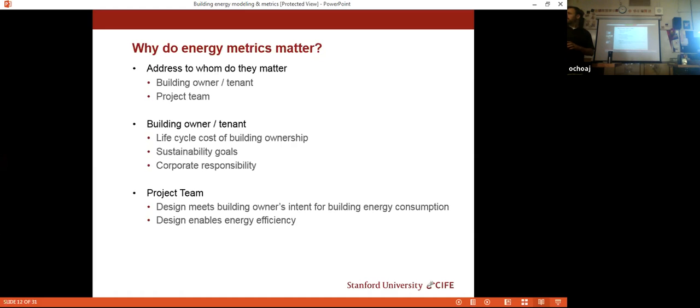He told me that they estimated a project, and the client said yes to everything. But when they started the project, they didn't estimate the energy cost of building, bringing the materials in, and the tools they were going to use. So that was extra money the client didn't have. That's a big deal. What was the solution? They used a plan for making energy for the project, and they had to pay extra.